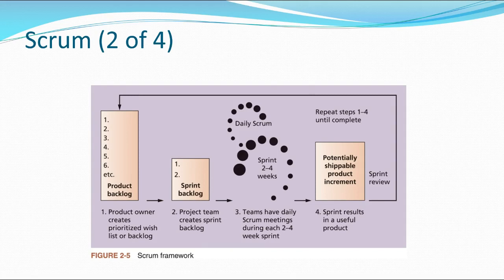They're the person who develops what we refer to as a product backlog. That's the list of attributes or functionalities we want to see in the product. At that point, the project team works on creating it and they sprint the backlog. They have daily meetings, and the general time frame is a 2 to 4 week sprint where people are doing very rapid-fire development. And you basically keep on repeating the process until you've got a useful product.